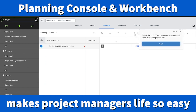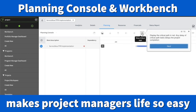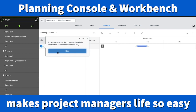Here is another way of indenting and unindenting the WBS — the Work Breakdown Structure list. Once you click over here, you can add the number and change the position in the WBS number of the task. This is the critical path — wherever you have critical works or tasks, they will be visible here. Any delay or anything related to your project's critical items will appear there.